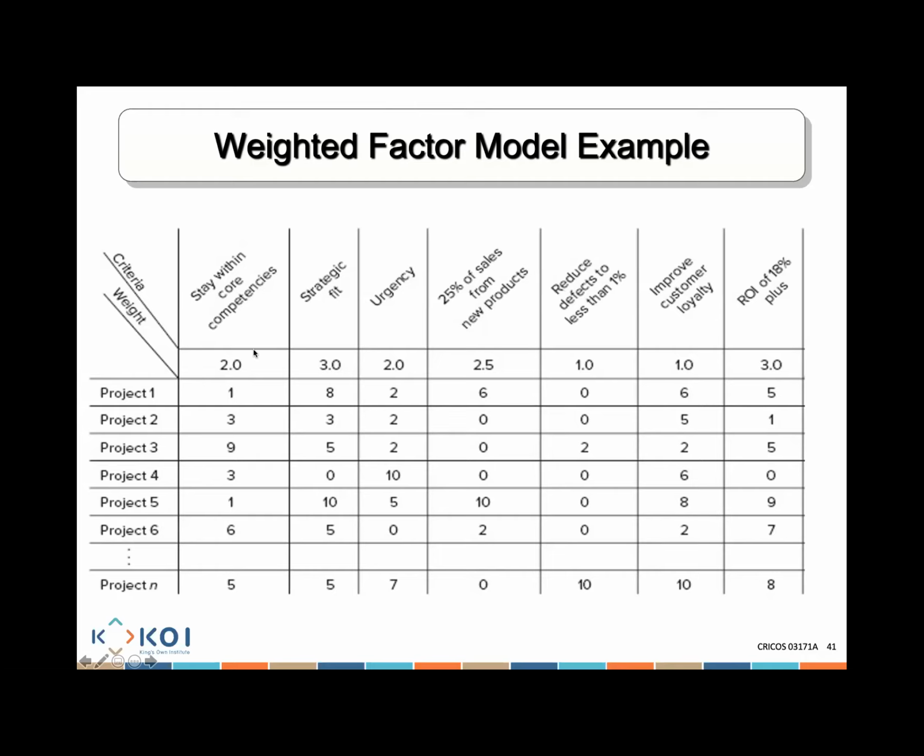So there are different weights being given to different criteria. The higher the weight, the more important. So the most important criteria between all of these are strategic fit and a return on investment that is over 18%. They are the most important criteria for us, and that's why we gave them the highest weight.